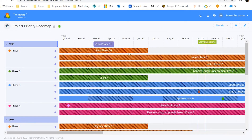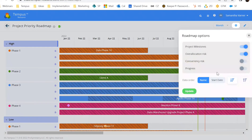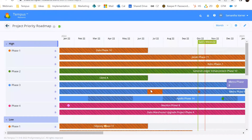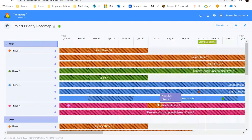One great thing about this roadmap is it shows you any risks to your project. Tempest has defined risks as an over-allocation risk — when your team is over-allocated. There is also concurrency risk, where you can say your resources should not be assigned to more than five projects at any given time period. Additionally, if you are using the actual allocation data set, you can have a progress bar display within the Gantt bar of the project. Right now, my roadmap is showing an over-allocation risk, and in July 2022, almost all of my projects are shaded, meaning a risk is present.